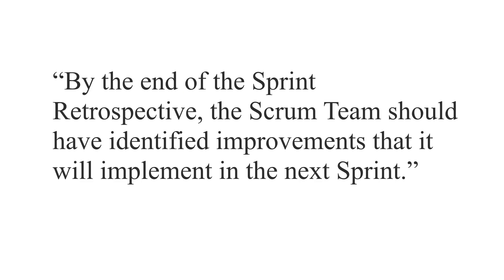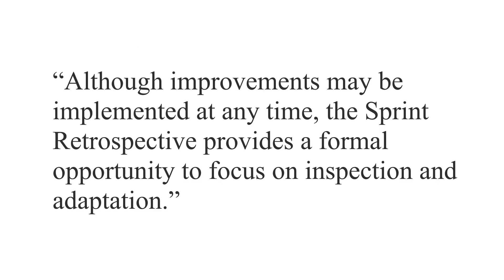I think I'd better check in with the Scrum Guide. By the end of the Sprint Retrospective, the Scrum team should have identified improvements that it will implement in the next Sprint. The next Sprint — so soon? Although improvements may be implemented at any time, the Sprint Retrospective provides a formal opportunity to focus on inspection and adaptation.